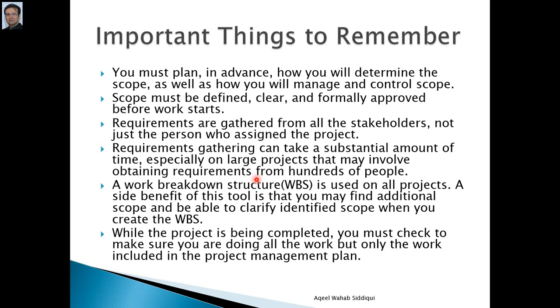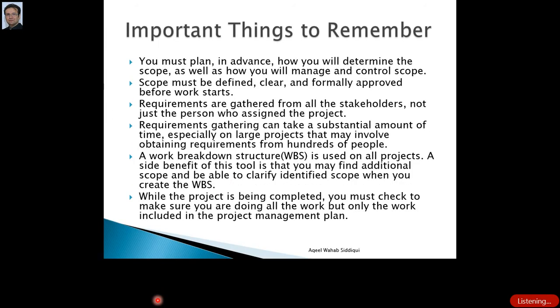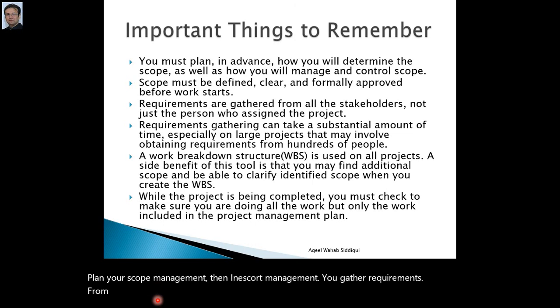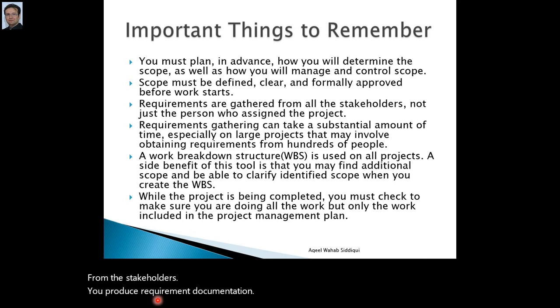So what we do, our first step is to plan your scope management. Then in scope management you gather requirements from the stakeholders and you produce requirement documentation, and then we also produce requirement traceability matrix.